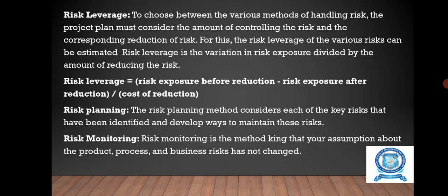Risk leverage. To choose between the various methods of handling risk, the project plan must consider the cost of controlling the risk and the corresponding reduction of risk. For this, the risk leverage of the various risks can be estimated, and this risk leverage is the variation in risk exposure divided by the cost of reducing the risk. Risk leverage is equal to risk exposure before reduction minus risk exposure after reduction, divided by the cost of reduction.